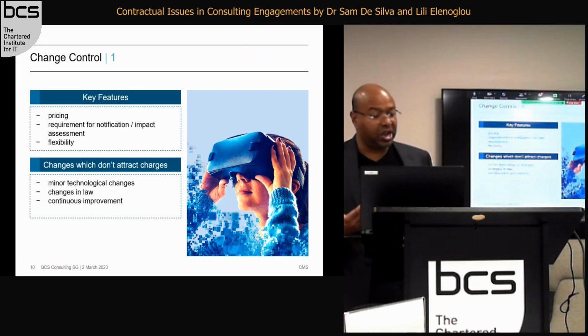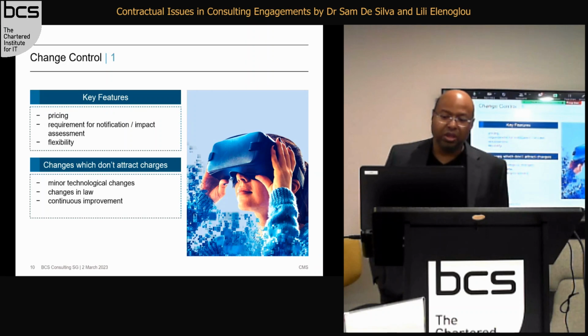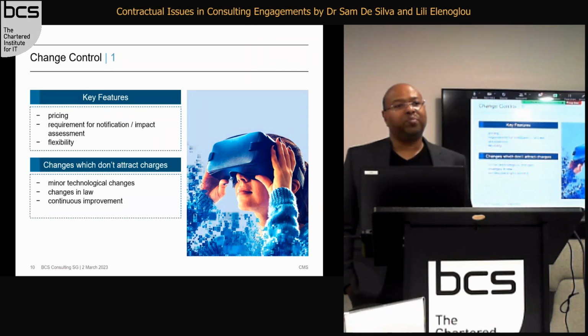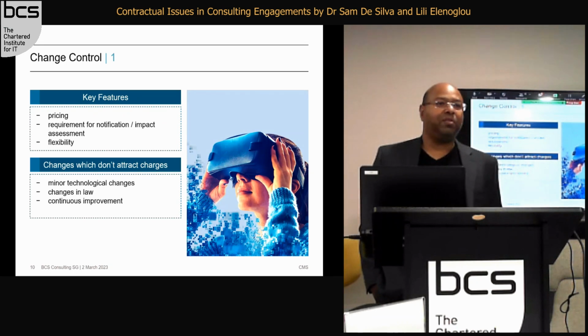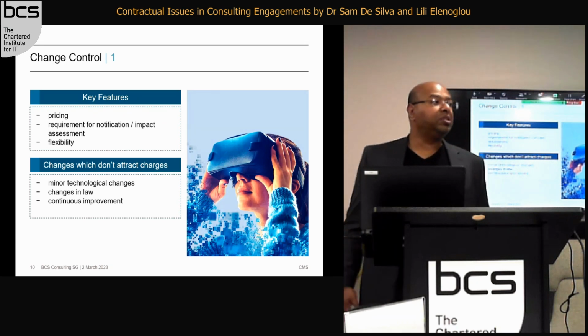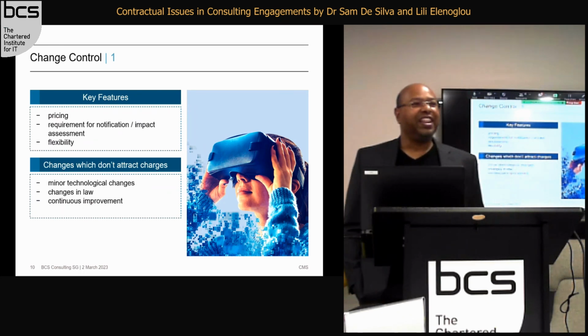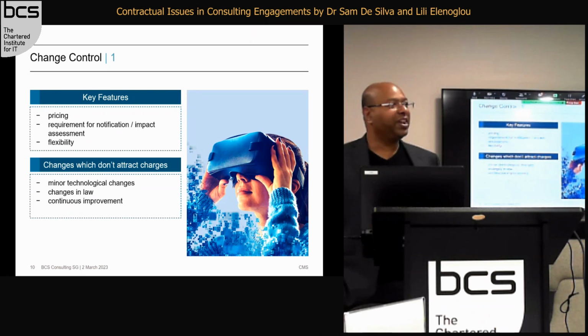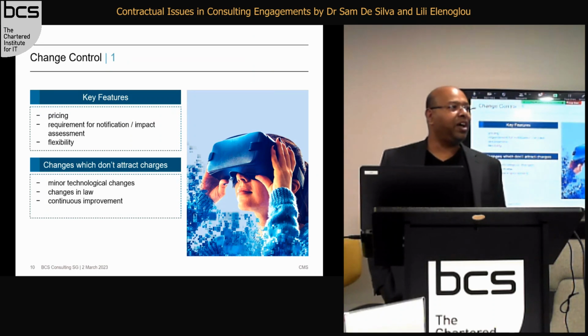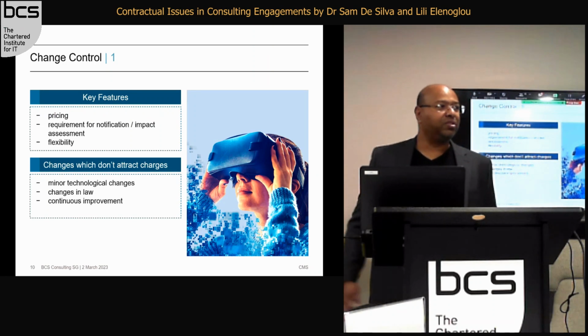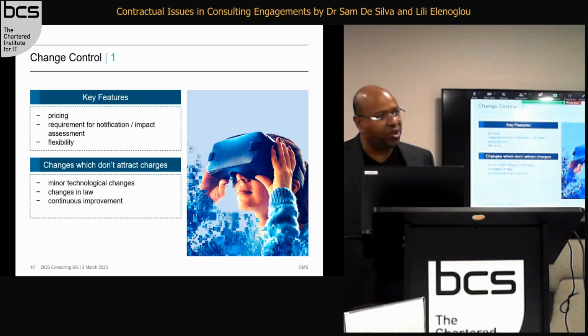Often customers will say, as a result of change control, if you're going down the change control process, you need to give us an impact assessment. Now, you might want to consider having the ability to charge for that, because often clients may ask you for a lot of changes, and you go through a whole lot of work, and they go, oh no, we're not going to do that. So you may want the ability to charge and say, yeah, fine, we will provide this impact assessment or proposal, but we can charge for it. It's like a small piece of consulting. Whether that's acceptable or not depends on the negotiating leverage.